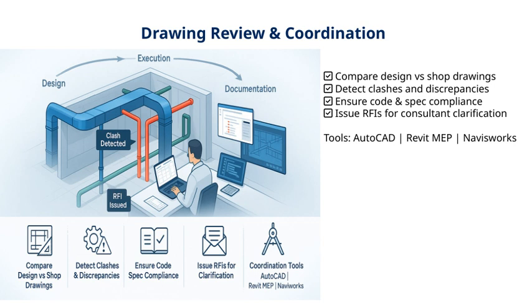Another key aspect is making sure that all our work complies with the relevant codes and specifications. This guarantees that we're meeting safety standards and regulatory requirements. When uncertainties or ambiguities arise, we issue RFIs, request for information, to seek clarification from consultants. This keeps communication clear and helps us avoid mistakes.